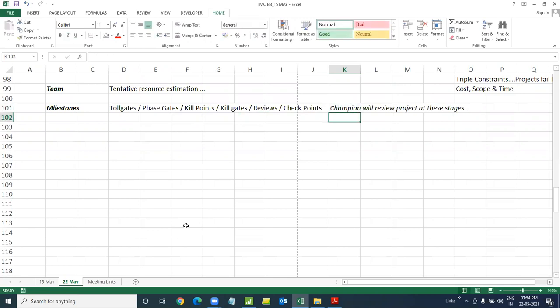So how do we do it? Basically you mention a tentative timeline: define, measure, analyze, improve, and control. And you have your start dates and end dates. So whatever the task, start date, end date. We want to say when define will start, when it will end, when measure will start, when it will end, analyze start date, end date, and so on and so forth. So we'll give a flow of the project tentatively, how long it will take. This is the initial preliminary discussion that we do, and we submit a project charter to the management.